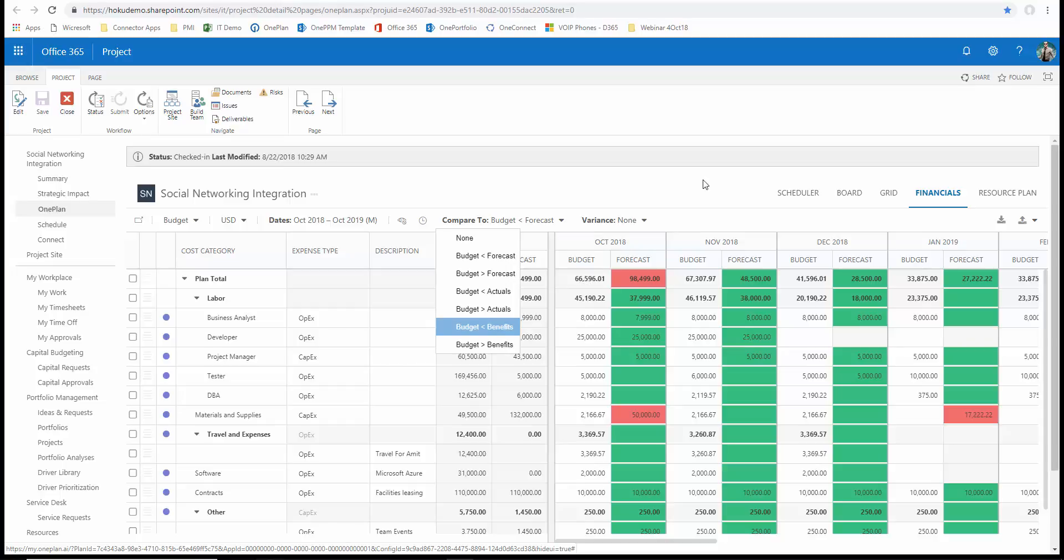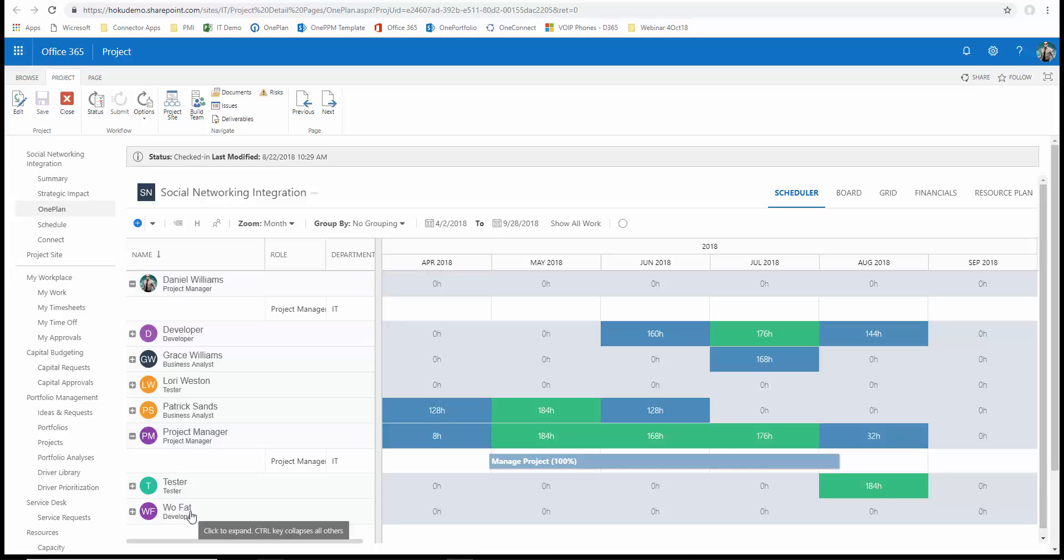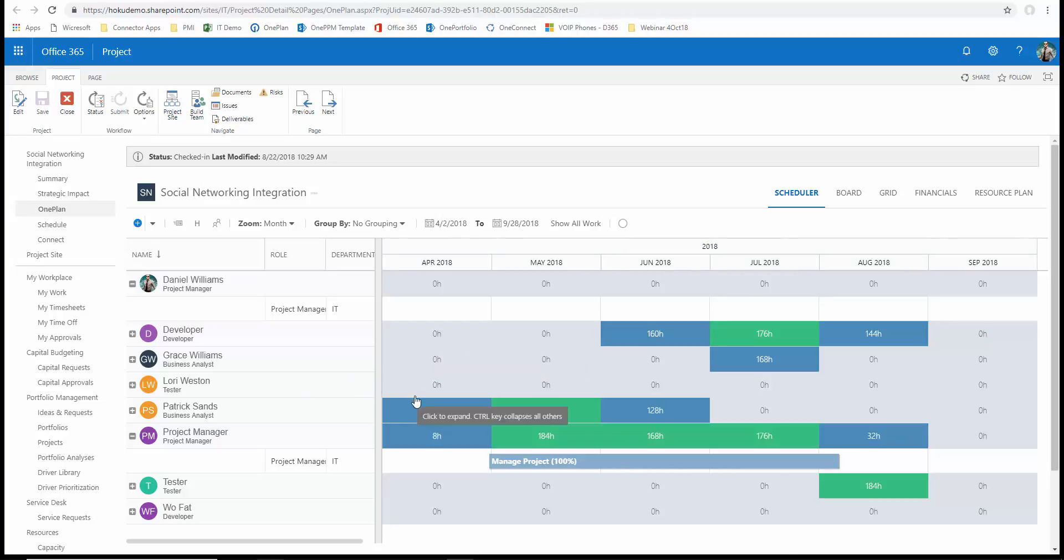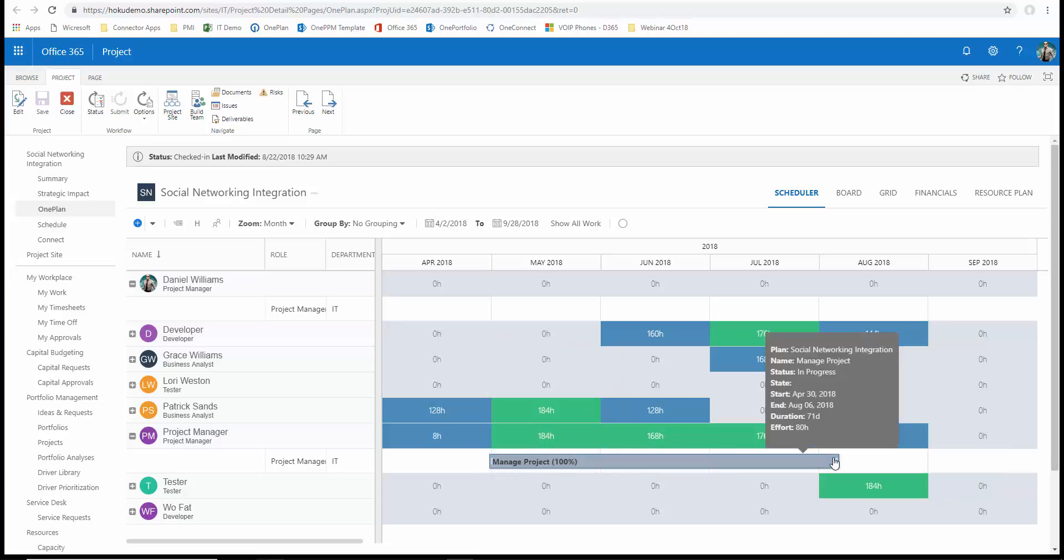We also have the ability to do resource scheduling. And in that resource scheduling, as opposed to the capacity planning and the resource plans we did earlier on, this leverages the Project Online resource pool and allows us to allocate resources to these specific projects. In this case, notice I've got a combination of generic and named individual resources here. I can look at a varying timeline. I'm currently choosing to look at this in terms of months. And I can also look at these engagements like we have in Project Online and look and see that a project manager at a very high level, long before we have a schedule, we can say is needed to manage the project from May through sometime in early August.